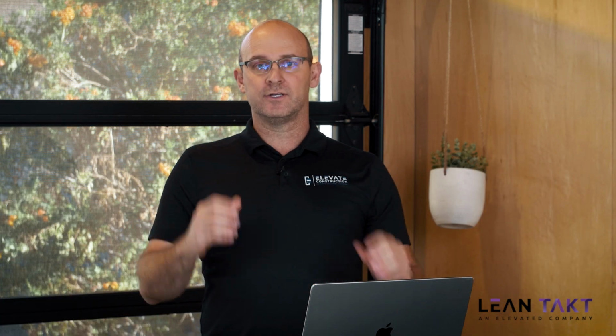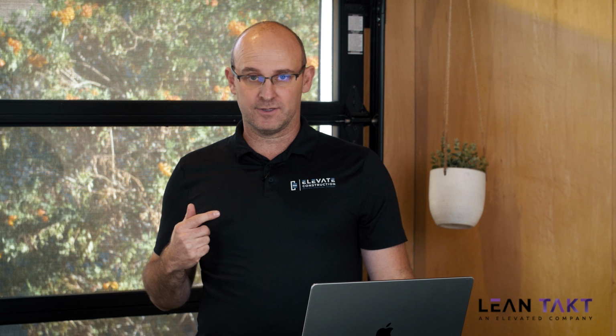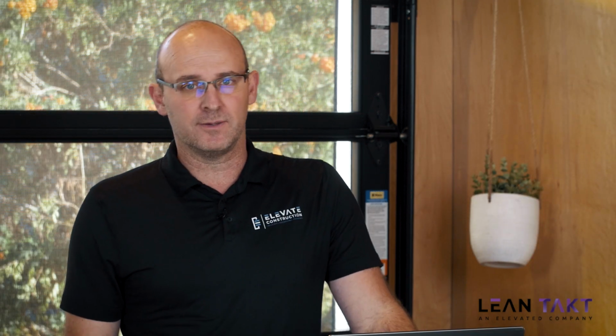which is literally put into a graphic for everybody to see on the project site. Those are the deliverables. And then you can track percent plan complete, your perfect handoff percentage, your roadblock removal average, and other key metrics from there. But those are the deliverables. And so what I'm asking you to do is to be open to the meeting structure, open to the deliverables, and to really embrace the Last Planner system.